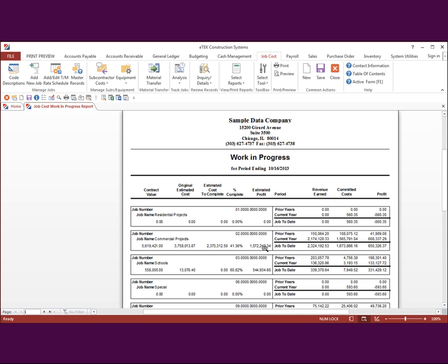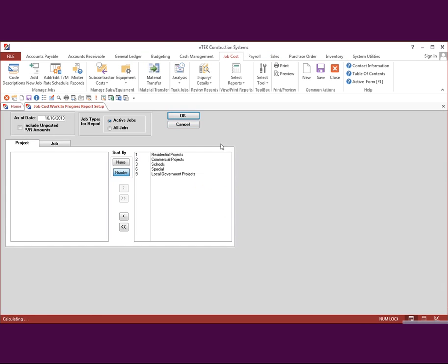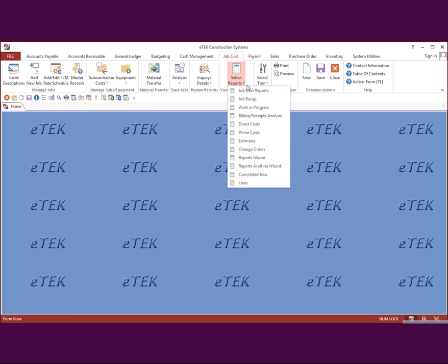Now, where do we stand job to date? That's the right-hand side of this. Job to date, where we stand is we've earned this much revenue, and based upon the percent complete, we can apply this much in committed costs. I failed to mention earlier, if a purchase order has been approved, it's included in committed costs. If a purchase order has not been approved, then it's not included. But anyway, job to date, we've got a profit of about $650,000. It looks like when we get done, we're going to be about a $1.5 million profit. So work in progress is a very important part of the top management, project management thing.